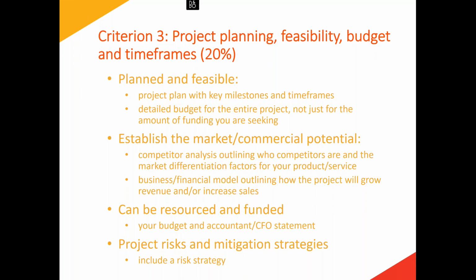The other thing that Brian mentioned was milestones. So when you fill out your application, you elect to tell us what your key milestone dates will be over the life of your project. Normally for a Tier 1, that's 3 milestones, and normally for a Tier 2, that's quarterly milestones. And it's important that you really think carefully about your milestones, because you'll be held to account through the acquittal payments that we make to you, that you've actually achieved and hopefully done better than your milestones.